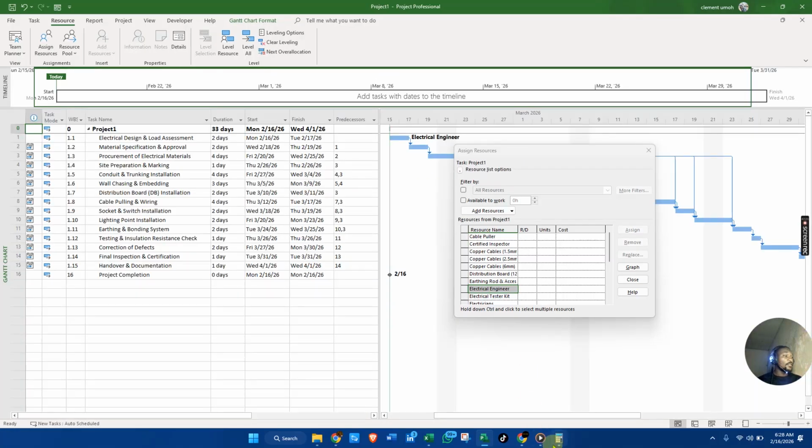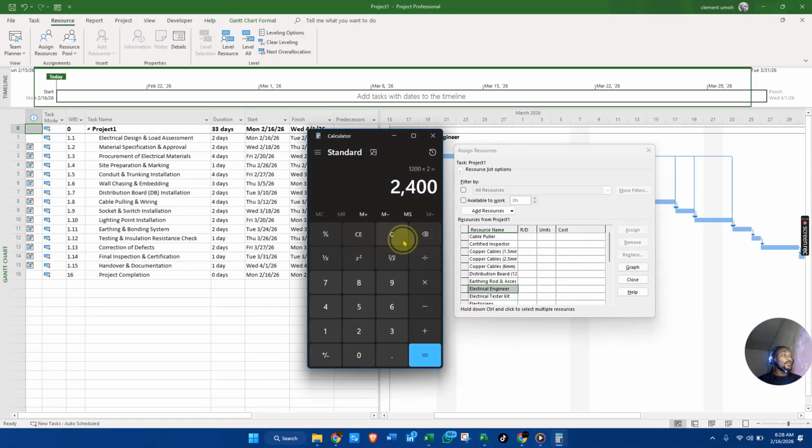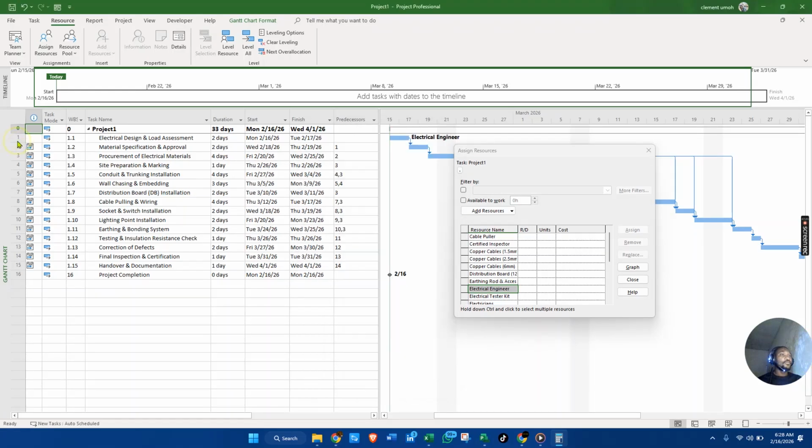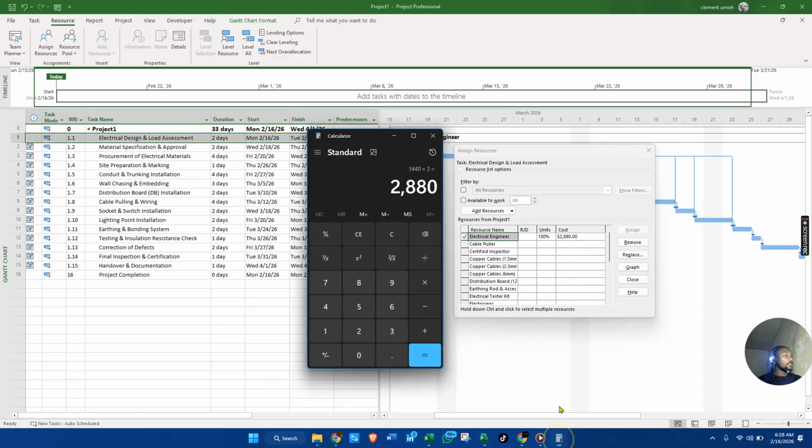So you have to keep that in your head. So it's 180. So you cancel this totally. So it's $180 times 8, which is the total hours in a standard working day, and times what? 2,880. So we've actually gotten our price over here. All right. Then I've sorted it out.